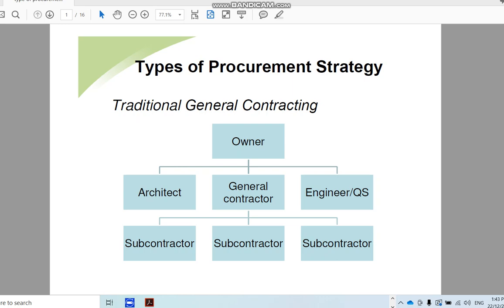So you see, the engineer does not have a contract with the contractor. So the relationship is the owner with the professionals, and the owner with the contractor, and the contractor may have other agreements with his subcontractors, and of course the professionals can also have their own agreements with any of the other professionals under them, such as mechanical, electrical, or QSs. So at the end of the day, the signing parties will be owner and contractor, and owner and engineers or design professionals. So that will be the usual way.